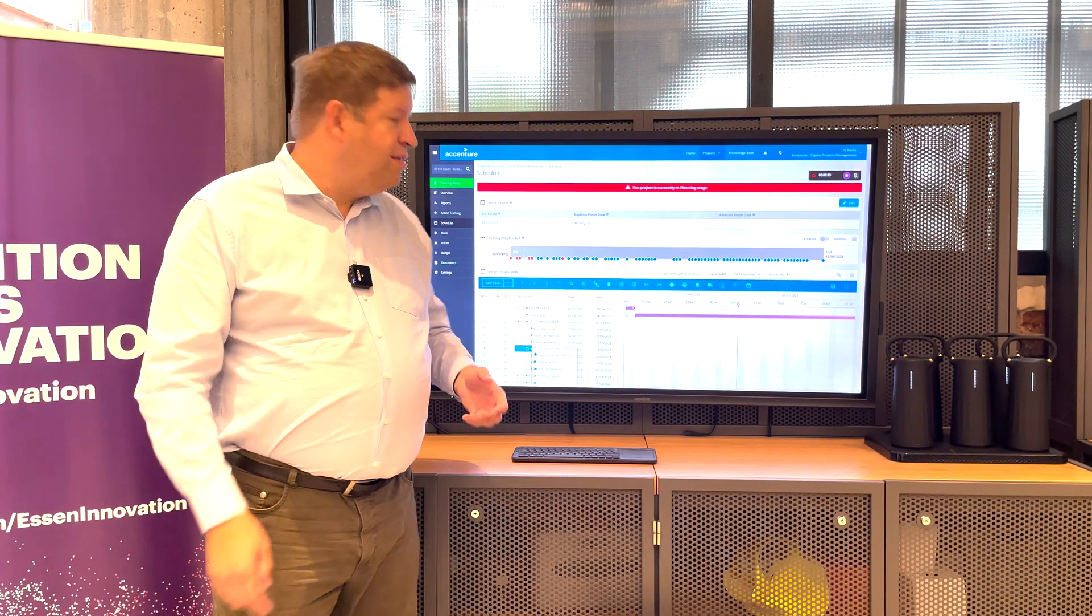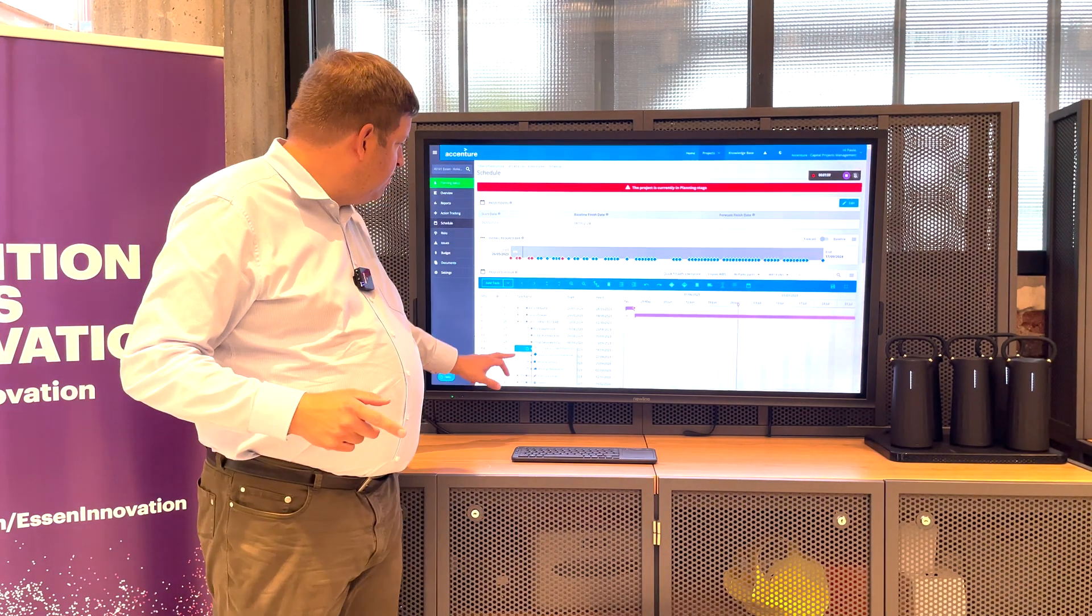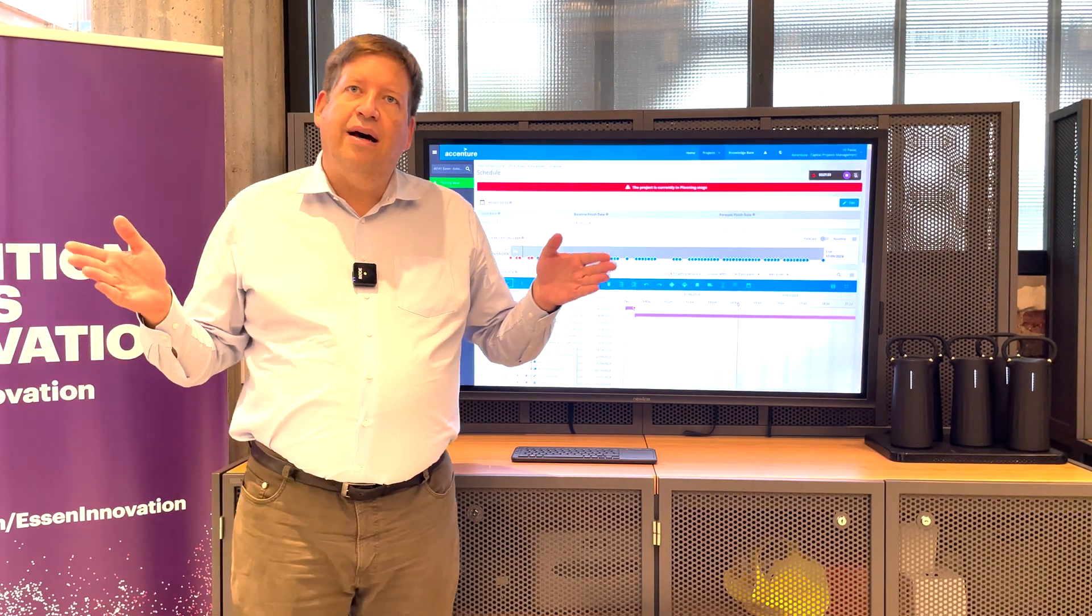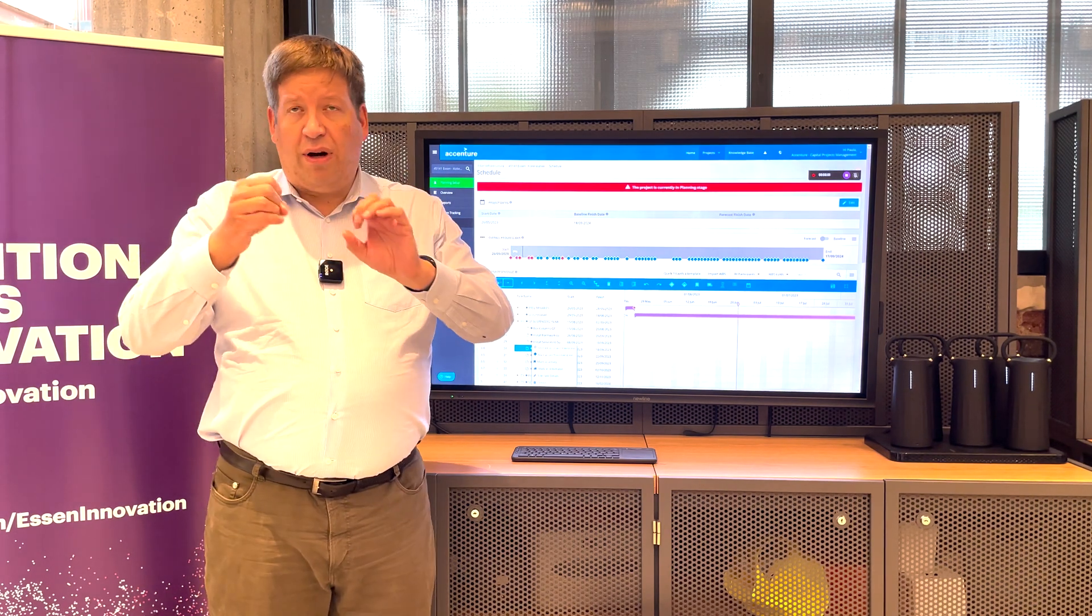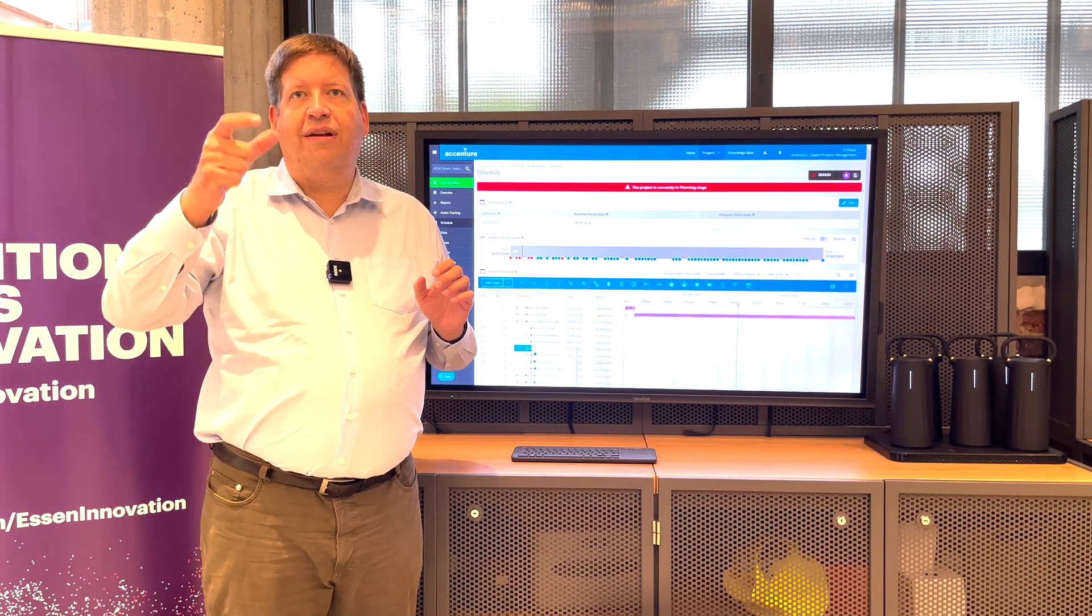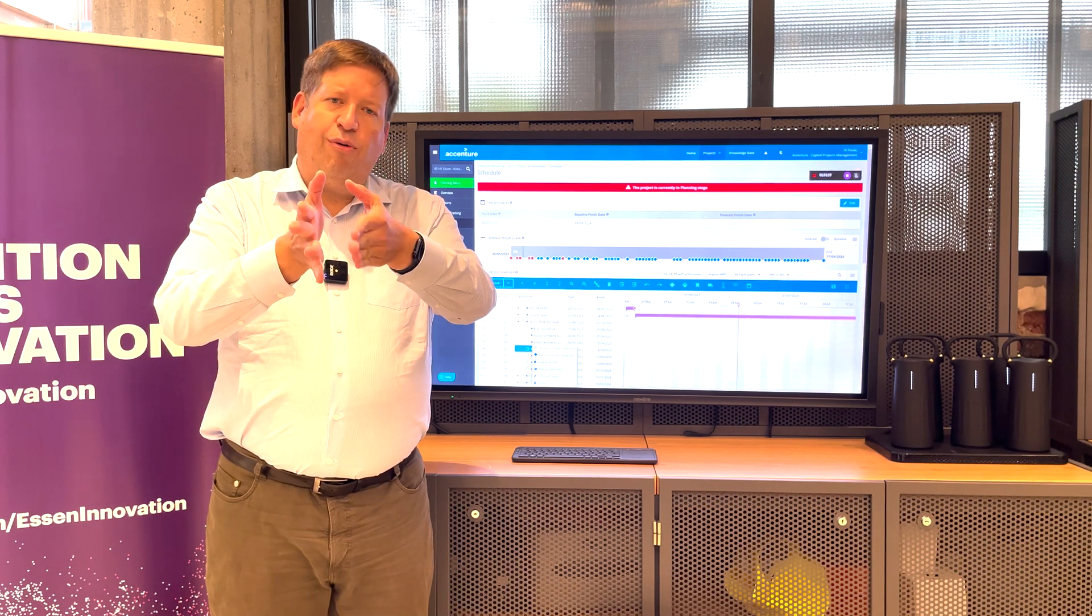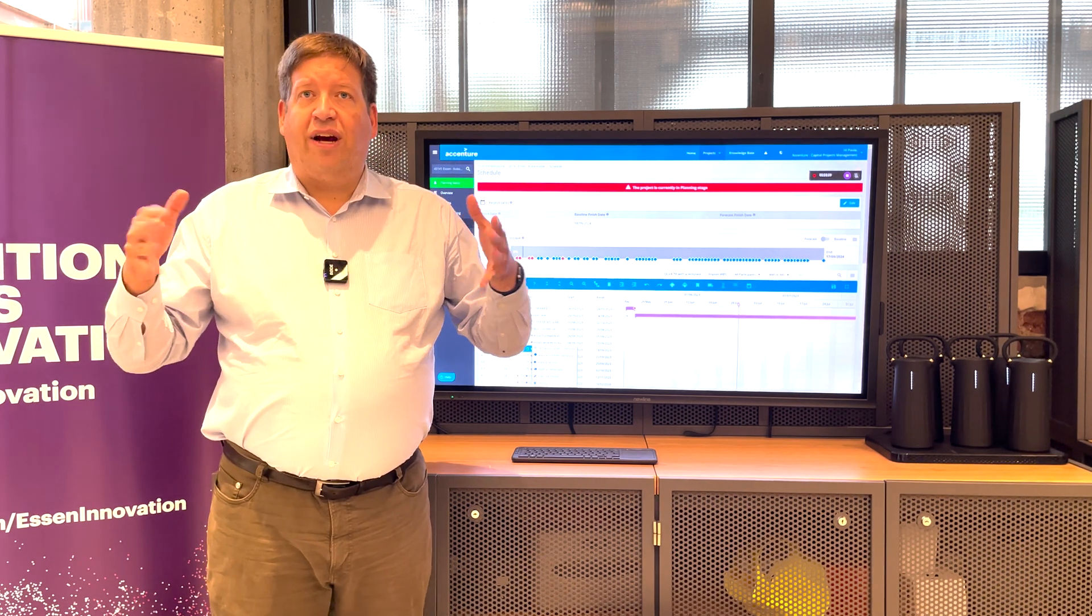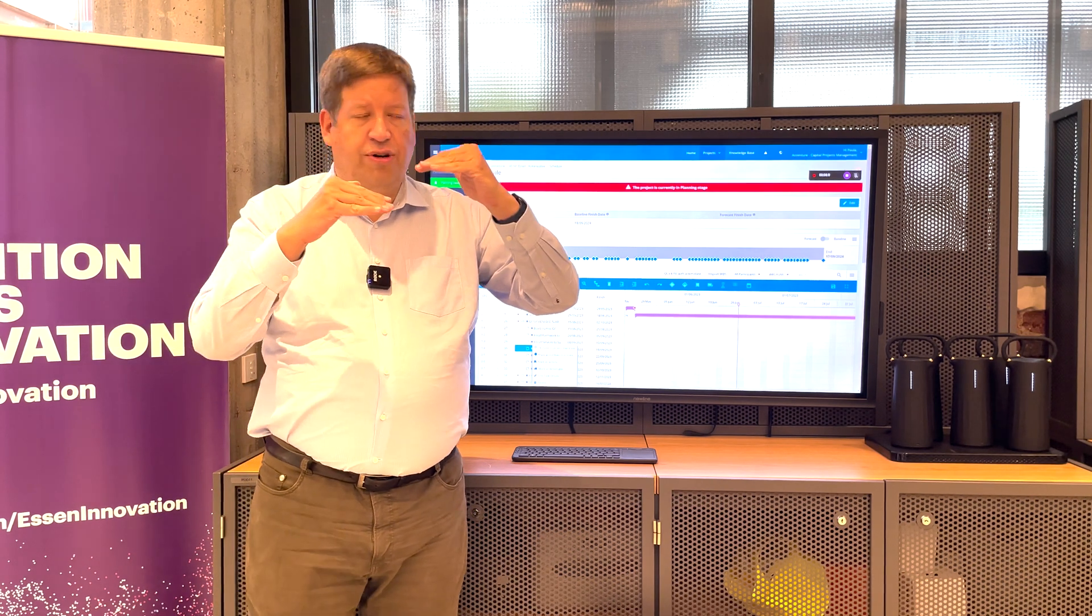Then you can say that activity of doing that takes that number of days. And then you can also click here by having one click, you also associate this with a deliverable, which is really nice because then the deliverable tracking and the activity tracking is not two separate things. It's combined to each other.